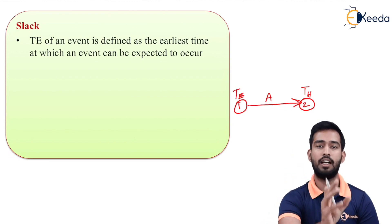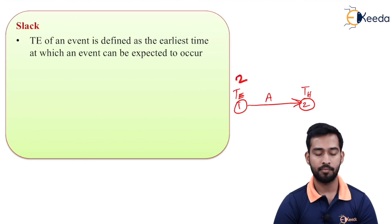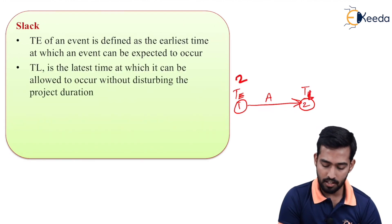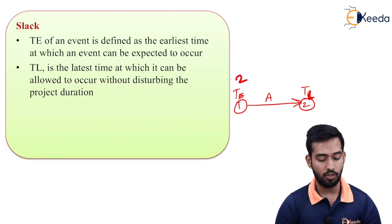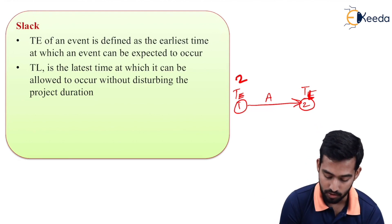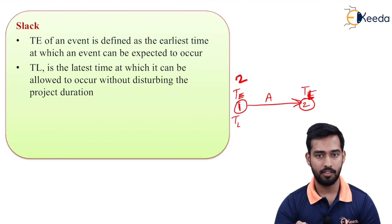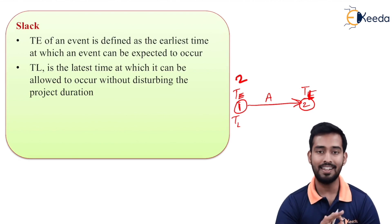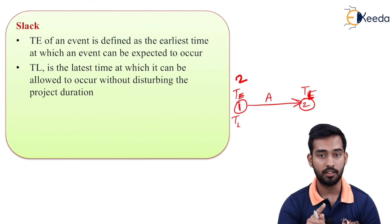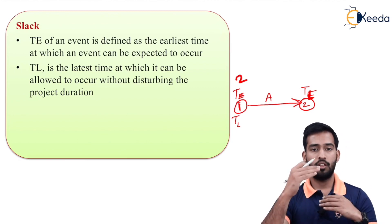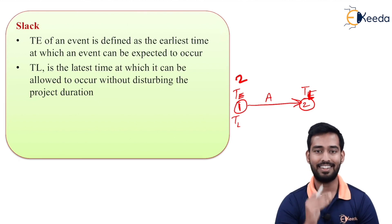For example, activity A can start at two days, so on the second day we can start activity A — that is known as Te. And TL is the latest time at which it can be allowed to occur without disturbing the project duration. So Te is the earliest time at which the activity can occur, and TL is the latest time when we can start that particular activity without disturbing the project duration.